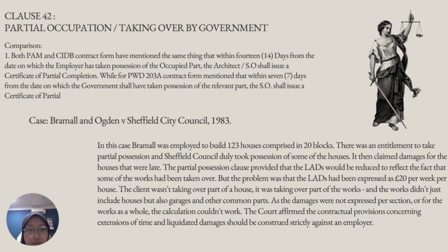The partial possession clause provided that the LAD would be reduced to reflect the fact that some of the work had been taken over. But the problem was that the LAD had been expressed as £20 per week per house. The client wasn't taking over part of a house. It was taking over part of the works.